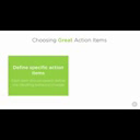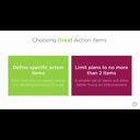And secondly, although many new Scrum teams can often come up with numerous ideas for improvement, I would ask you to remember that you will also be planning a full sprint's worth of work that you'll also need to focus on in parallel to these action items, and that Louise, as your Scrum Master, will be holding you accountable to completing each of them. For this reason, I'd encourage you to keep the set of action items that you select for each sprint small. In fact, I usually recommend that Scrum teams commit to no more than 2 action items from each retrospective to give you plenty of time to focus on each.